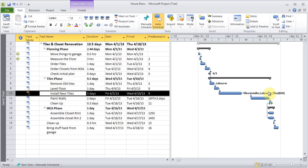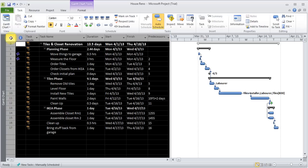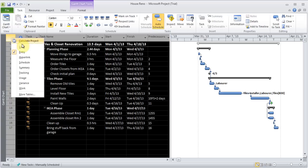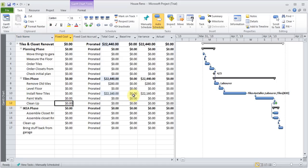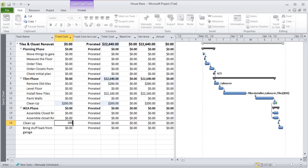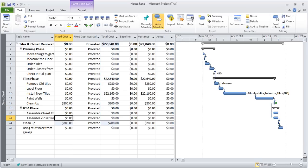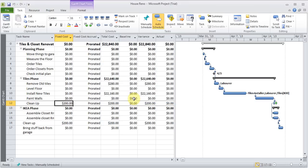Now if I wanted to add a fixed cost, like for clean up. Instead of adding it through there. I could just come here and click in the corner. Right click. Choose cost. And there's this fixed cost line showed up. Now I can go to clean up. And say this person is going to charge me $200 a day. It doesn't matter how many hours it takes. So I can go ahead and add that. So now that is added. Say yes to saving.